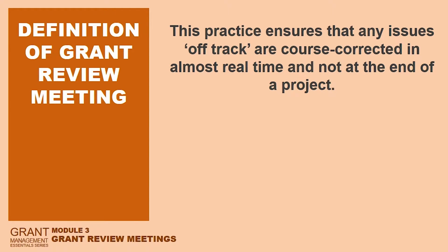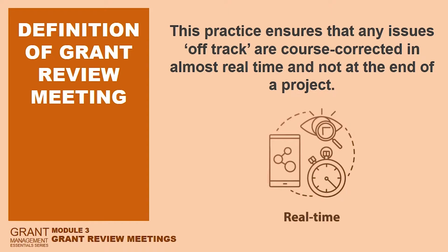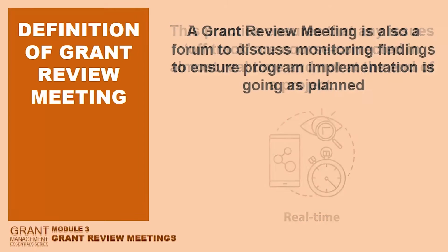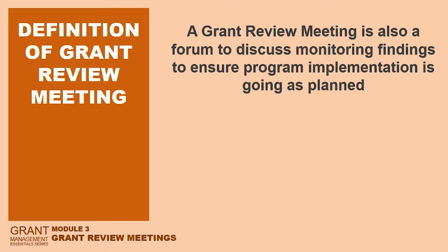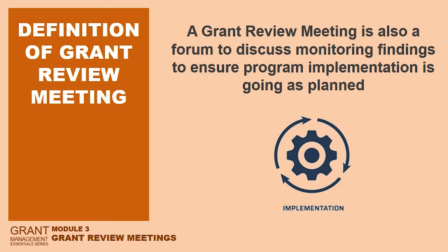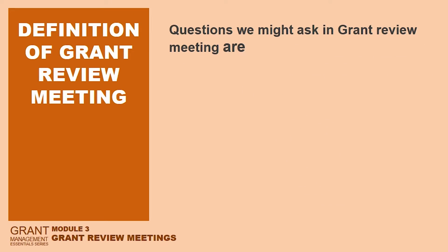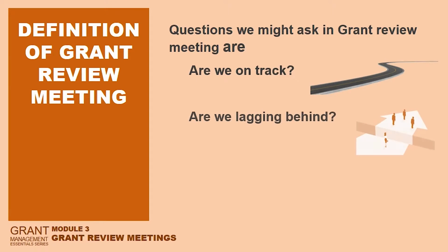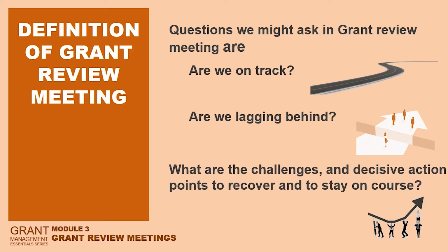This practice ensures that any issues off track are course corrected in almost real time and not at the end of the project. A grant review meeting is also a forum to discuss monitoring findings to ensure program implementation is going as planned. Questions we might ask are: are we on track? Are we lagging behind? What are the challenges and decisive action points to recover and stay on course?